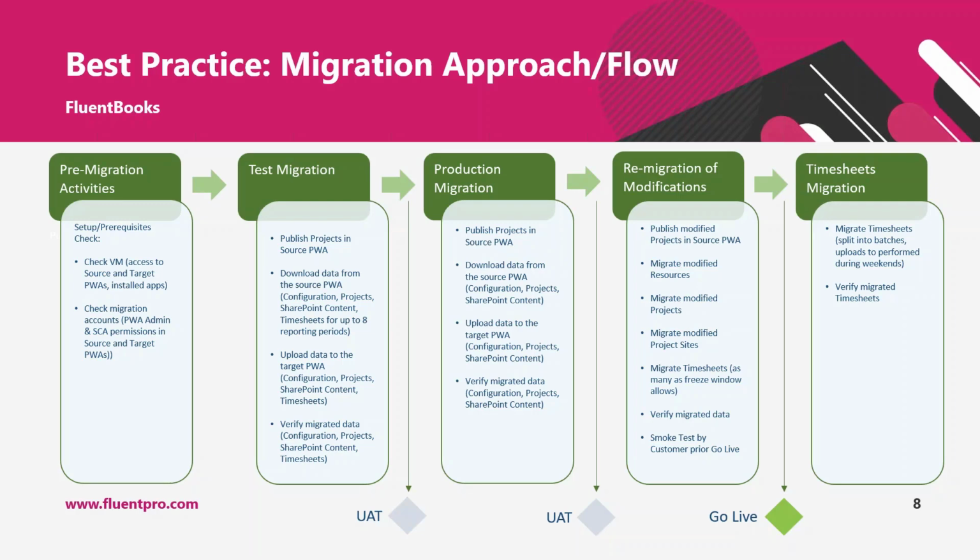If the source environment was not frozen during production migration, then another step is added, remigration of modifications. Modified resources will be migrated, modified projects, and modified project sites. Also, if timesheets migration is part of the migration effort, during this small phase we would migrate as many timesheets as the freeze window allows, verify this migrated data, and then the Project Online environment will be ready for the users.